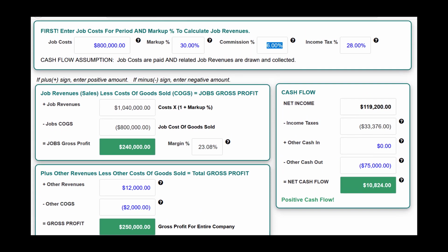So hopefully you get a concept of putting these other things in and deciding, well, I'm going to have to put a 30% markup in, because again, the 25% for the 20% gross margin is not going to cut it and give me what I want to take home for my lifestyle.